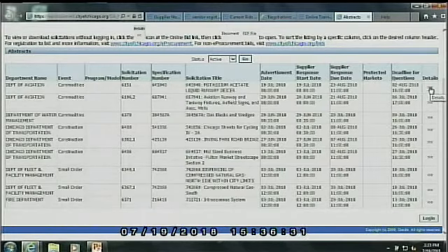Hold please. So there's the solicitation number. There's the specification number. Here's your title that's preceded by the specification number. We have our advertisement date. That's the date that it hits the paper. We have our response date, which is the same date that it hits the paper. The supplier response due date is the date that the bid opens. And then your deadline for questions is generally always before the bid opening date, any date after the date of advertisement.